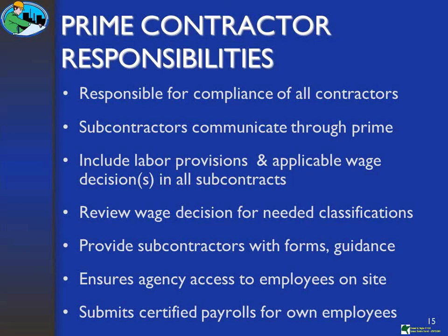9601 speaks to that kind of condition. But basically, if somebody is in that kind of condition, they have to be covered on whoever contracted their services. So basically, sub A, you have sub-tier 1, or A, is the backhoe operator, self-employed single operator.